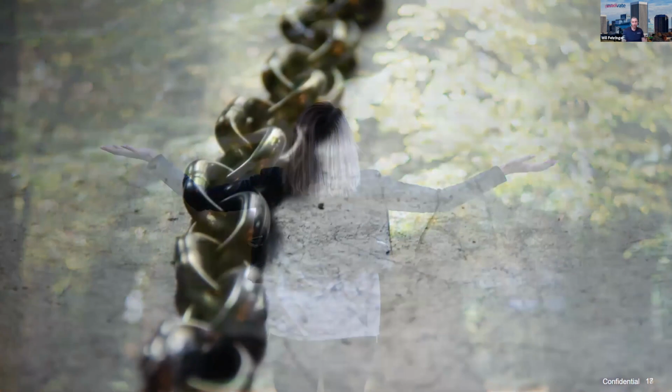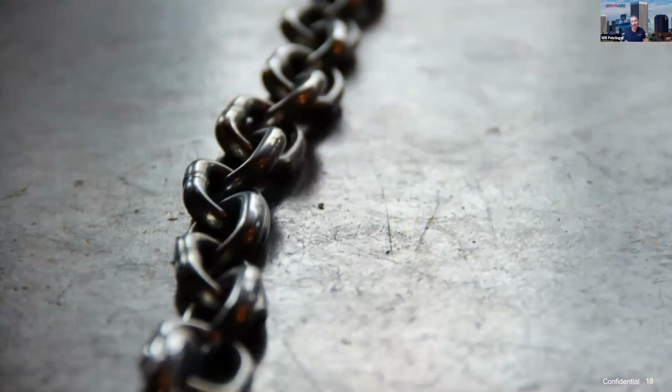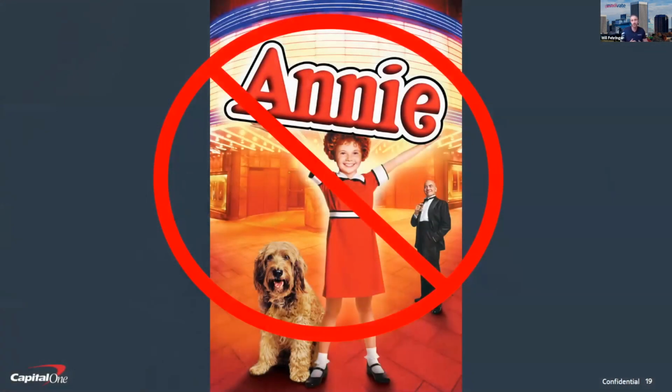All right, so those are really good examples of why there's a lack of freedom. But there's one that we found through our Jira Align implementation that we weren't really expecting, and it was actually a tooling concern. It was the idea in the tool that all things have to link up to a parent object, so that our stories have to link to features, our features have to link to epics, and so on and so forth. This is also called the no orphan rule.